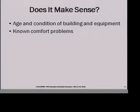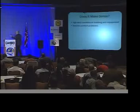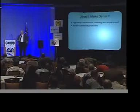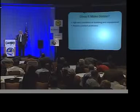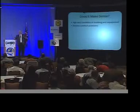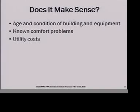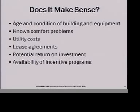Are there known comfort problems? Yeah, we already talked about his phone calls. If he calls me up and says, I heard about this retrocommissioning, and I've got a portfolio of a bunch of buildings. I don't have enough money to commission or retrocommission all the buildings, so you tell me which ones I should put my money into. That's a reasonable question, right? So you get with the facility management staff and say, give me your calls, your maintenance failures, some history, and you start going through it. Known comfort problems. Utility costs, have any of them spiked? Lease agreements. Is somebody else responsible for the cost of improving or balancing this? How much can you do? Potential return on investment is always a question, and availability of incentive programs. Any way to make it cheaper.